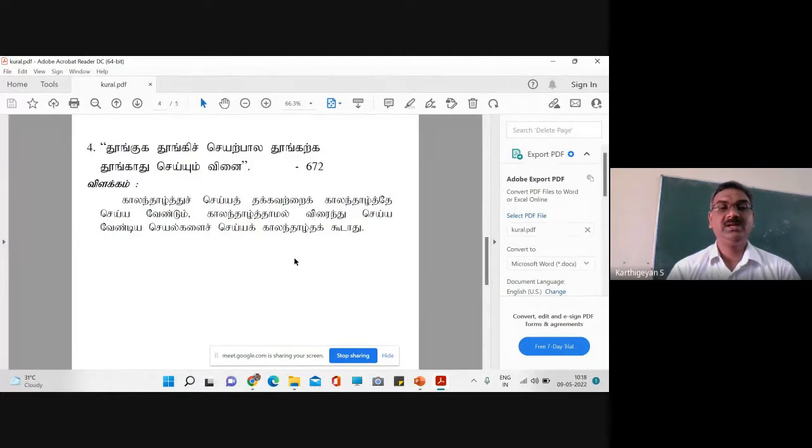You have studied, or you are going to study, the critical path method, which is a project management concept: how to plan the project to complete the entire project in minimum time. In that there is a methodology called the critical path method, in which you identify critical activities and non-critical activities. What do you mean by critical activities? The activities that should start and complete in time. You should not delay these critical activities. In the case of non-critical activities, you may have a float, either total float or free float, which is the slack time in which you can leisurely do the activity within some stipulated time.